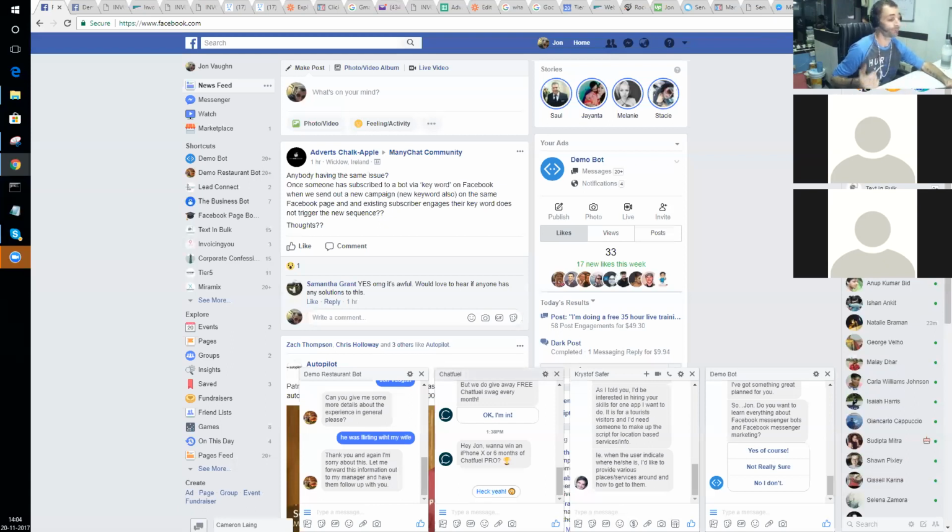And then if we're going to end up building a web application or a mobile application for you, at that point we have to have a lot more conversations to figure out what this application is going to do and how it's going to work. So we figure all that out. Then we give you a rough estimate, using a Fibonacci sequence to come up with a low and high range, and whatever it costs to build is guaranteed to be somewhere in that range.